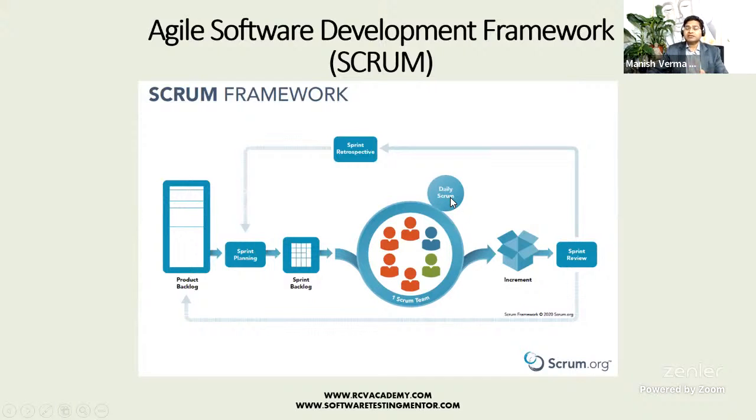Now, in the Scrum, during this sprint, every day there is a daily Scrum as well, which is nothing but a meeting wherein the development team comes together and they see whether we are able to achieve the sprint goal, right? So if, for example, in this particular sprint, we have picked 5 user stories, and these user stories are to implement the registration functionality on the portal, right? So will we be able to complete those user stories or not?